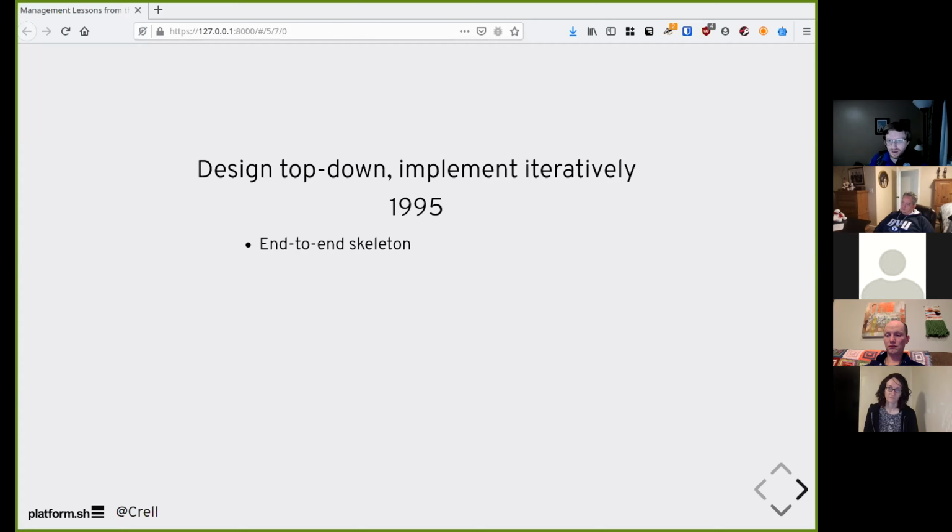In the case of a PHP web app, a lot of this is handled by just the framework itself. It's, hey, can you accept requests? Can you respond to requests? Can I log in? And that's done. There's your skeleton, boom. And after that, always make sure your system ships. It is in a shippable state. It may not be useful. In fact, it is probably not useful. It is not going to solve the problem you're trying to solve, but you have a system that will compile and will serve requests and will run always. And then you grow modules into place and replace stubbed out pieces with real code that will actually do something productive rather than just be a mock that you run in production.